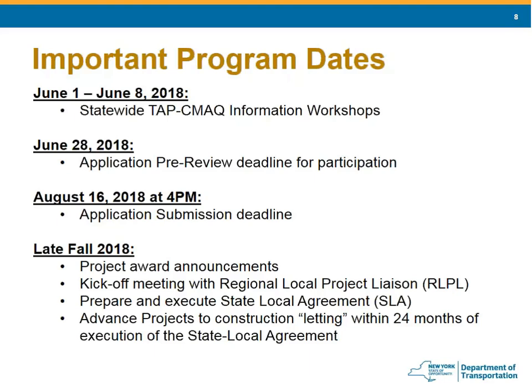After the kickoff meeting, you prepare and execute a state-local agreement, and then we advance the project to construction letting within 24 months of the execution of the state-local agreement. With that, I'm going to turn the presentation over to Dave McGowan, who is the RLPL in Region 9 and our resident expert.